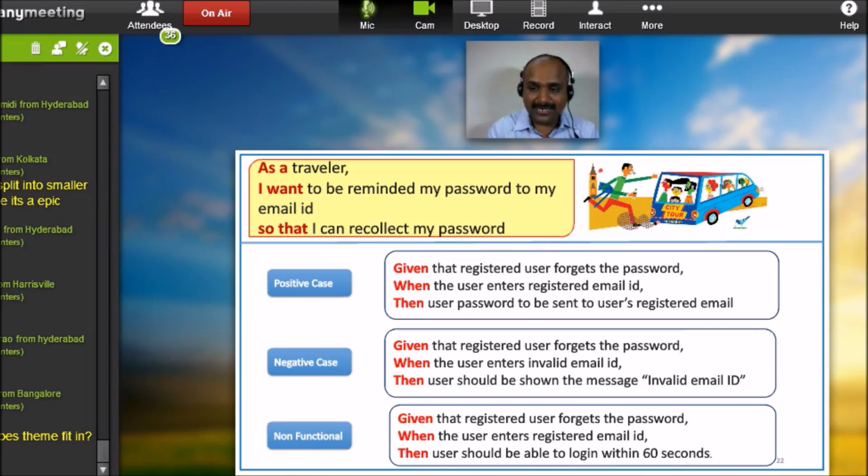So there are two things that I want to tell. A, the user story template. B, the template that we have to use for documenting the acceptance criteria. In the field, I come across acceptance criteria written just like "I want this" or "this is what is expected." I see product owners and teams together in their grooming sessions writing like this. They don't give importance to the scenario for that expected outcome, the trigger that actually causes it. It is important. The scenario and the trigger are also important for the expected outcome. Together only it makes good sense. So that's why I wanted to give you this framework here.